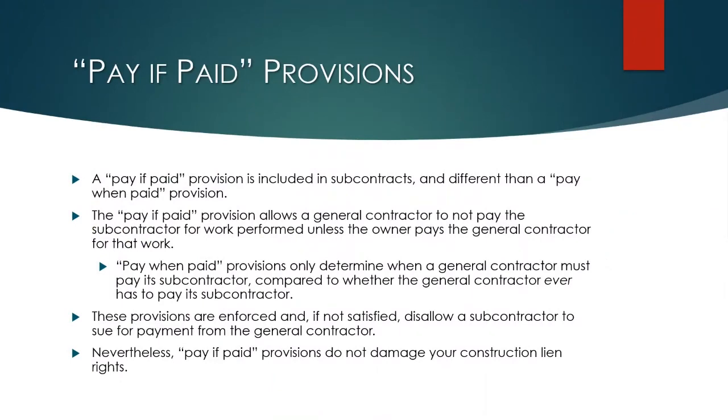A lot of times people will ask me about their contractual requirements and pay if paid, pay when paid provisions. You need to make sure that you understand how your payment terms work in your subcontract. That's one of the most critical components of a contract, how and when and how much you're going to get paid. Most of the folks on this webinar probably have heard pay if paid versus pay when paid, but a valid pay if paid provision as it relates to subcontractors and suppliers means that if the owner has not paid the general contractor for the subcontractor's or supplier's work, then the general contractor has no obligation to pay the subcontractor and supplier.